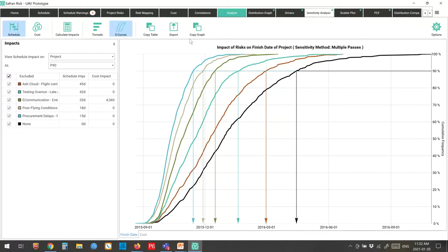And we realized that was kind of silly because he needed to know how long things were going to take in order to do his calculations. So we started changing a little bit where I would give him the likely outcomes of all of the activities that drove my costs, and he would build those into his cost model. And that's kind of what people used to do.